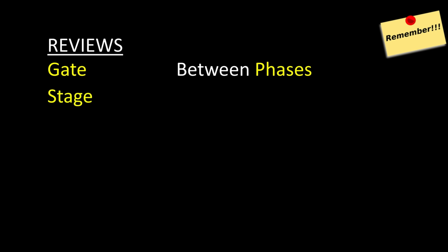We also have stage reviews. Stage reviews are more under the control of the project manager, and they appear as often and whenever the project manager suggests they should. They are generally found within that deployment phase. So it's when we're actually doing stuff and we're going to put in some reviews, and it may be after these particular tasks are completed, we're going to have a quick stop and check that they have been done correctly and that we're up to date.